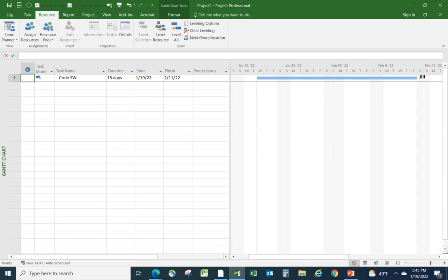Okay, so I've looked at a situation where we've got the standard project calendar, and Jill has got a couple of additional days off. Now let's do one additional step with Jill's calendar. Let's change her work week. Let's acknowledge the fact that Jill is actually working for us under contract, and Jill doesn't work any Fridays. We've already said that she's not working these particular 2 Fridays because she's taking some vacation. But per her contract, she doesn't work any Fridays at all.